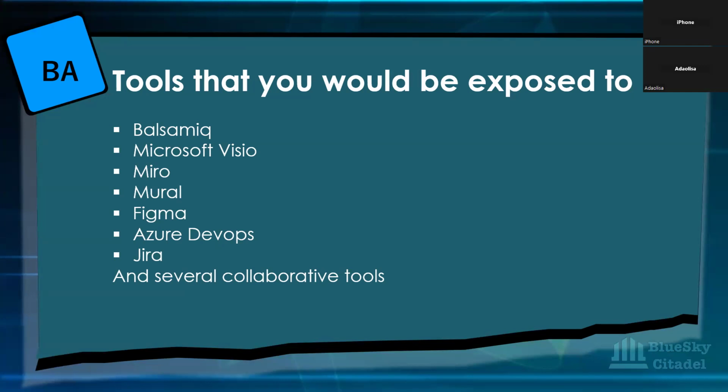And that user story is going to be written within your Azure DevOps. So let's say you are in an agile environment, for instance, or within Jira, that user story is going to be documented within your Azure DevOps, and everybody will have access to it. The stakeholder, the IT, everybody has access to your user stories. And remember that is a descriptive feature of one small functionality. So you're going to have, not millions, but a number of user stories for all the requirements that you have gathered. Once you gather the requirements, you begin to translate those requirements into user stories. So the user stories become what the technical team will pick up on and start working on.